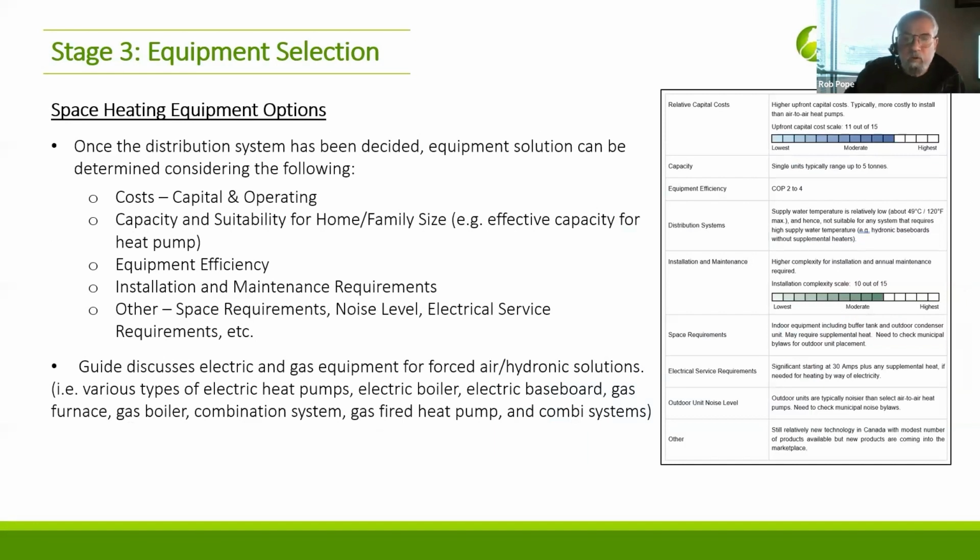When you're considering equipment choices, you want to look at equipment that you can get in the market area. We do work all over the place, and there are places where you can't get that product. You can get an equivalent, something else. Make sure it's available in the region you're in, that it has distribution support and technical support, and that the contractors install it, know the product, and have relationships with it.